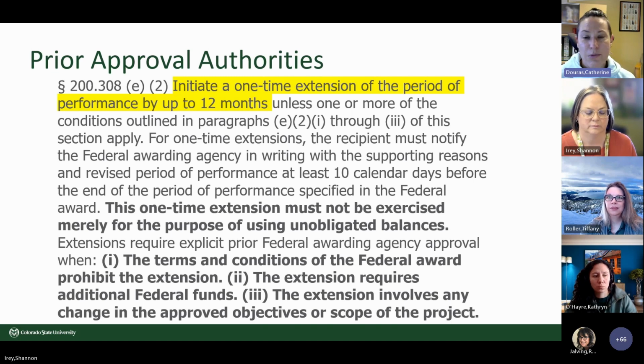A lot of agencies, when we request this, will send us an actual amendment. Team 5 works a lot with USDA and NIFA. We send them our no-cost extension request, and then they send us an actual amendment that shows the new end date. NSF doesn't always. Sometimes we just see the change in research.gov. So it kind of depends on the sponsor, but most of the time, once we've told our sponsor that we're exercising this, we'll get an amendment, and then we use that amendment to change that date in our system. And as Tiffany already said, we can't just request these for expending funds.